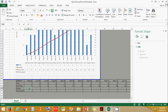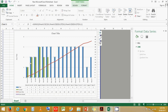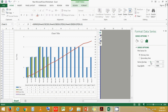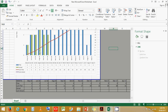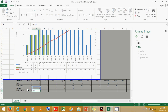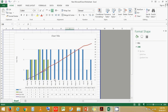Let's try to update this. We have cast 1 slab, 2 slabs. Now we have a plan and we have actual. Let's separate them a little bit for better viewing. We'll also add a cumulative graph. Let's give it a cumulative formula for cumulative actual and drag this. Before we move further, let's change the axis name. Let's type it as Plan Numbers. And for the secondary axis, let's change it to Cumulative Plan Numbers.